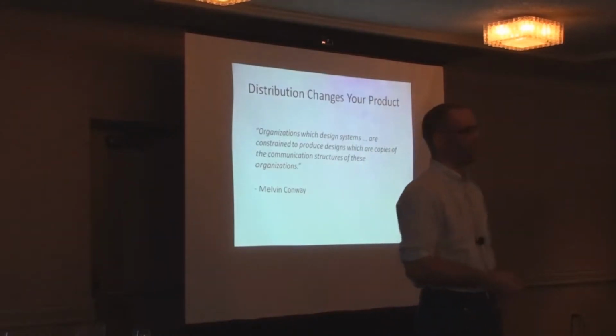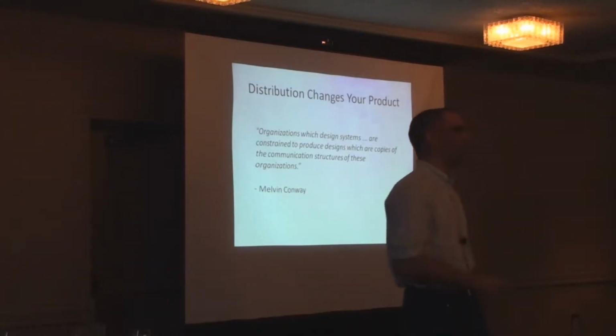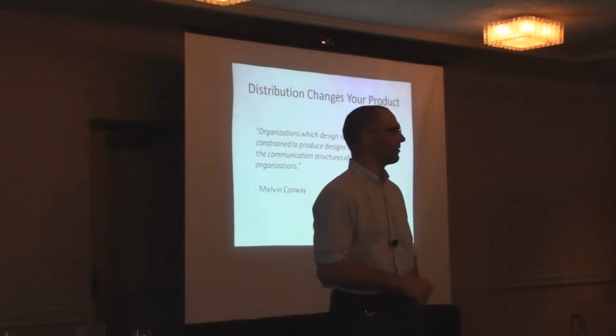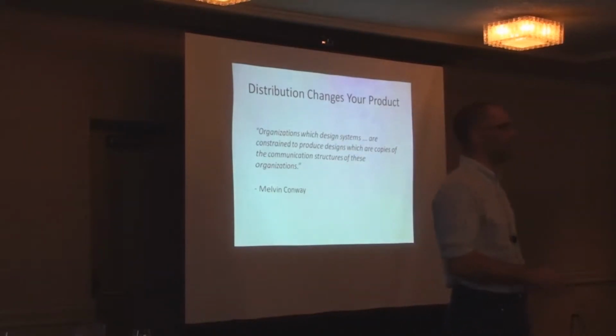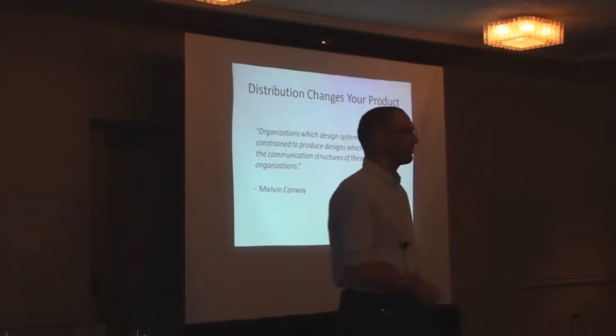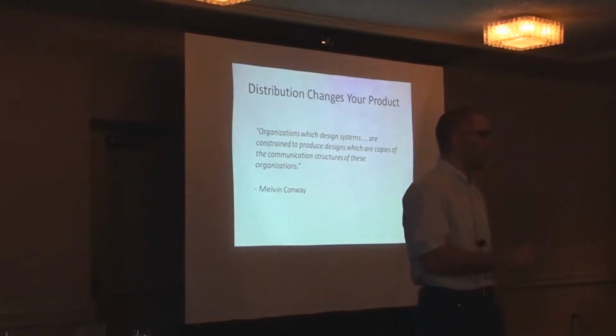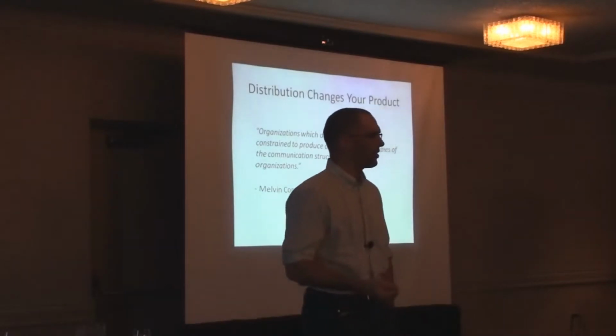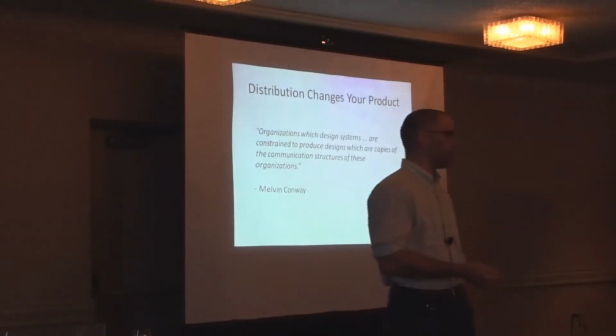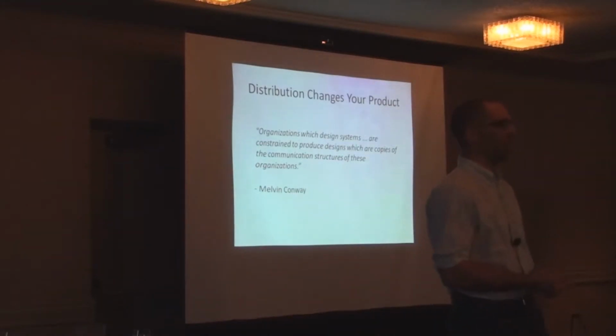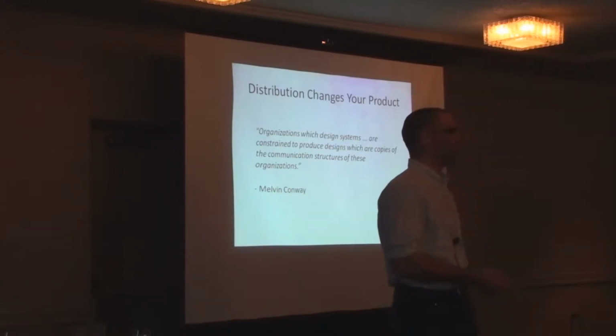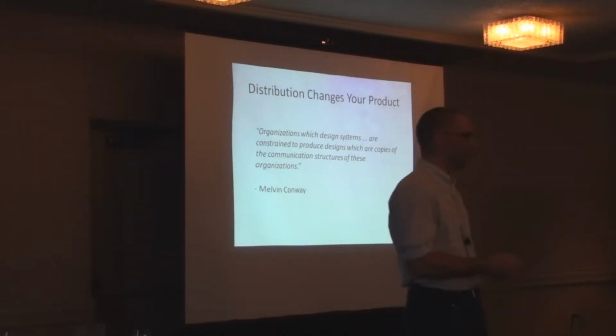And I'm going to say, well, because the guys in Argentina built one layer and then I built another layer in Redmond and some other people did something else somewhere else. And it's a 3-layer architecture, which, by the way, you have copied, because that's what we hope customers will do with some of our guidance, for no other reason than I happen to choose to distribute my team. So I spend a lot of time with our teams trying to get people to focus on user stories end to end, not components that are distributed across different parts of the world.